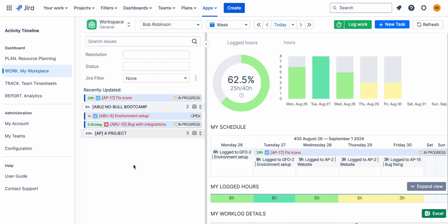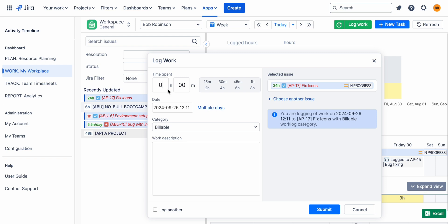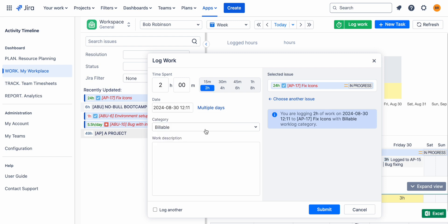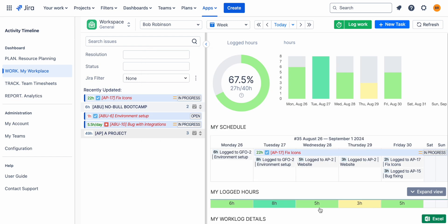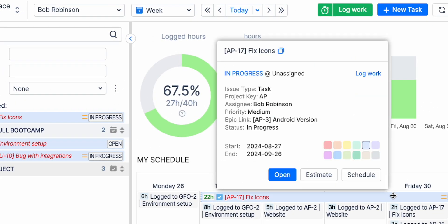Team members can log billable time against their assigned tasks in two ways. First, they can do it on their timeline, choosing from predefined categories like billable and non-billable. For that, navigate to their personal workspace and press Log Work.